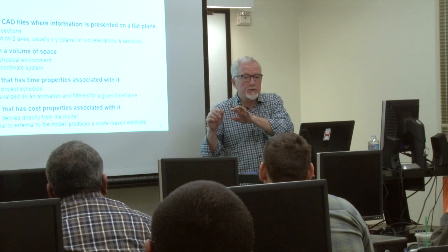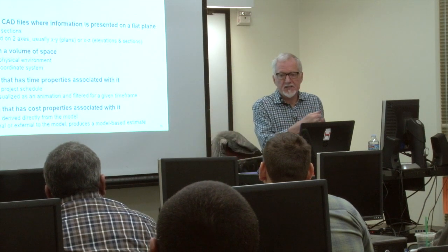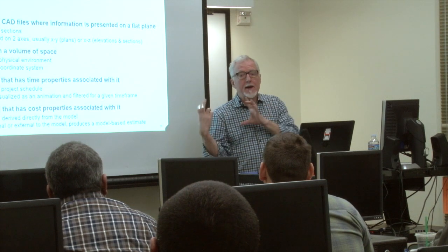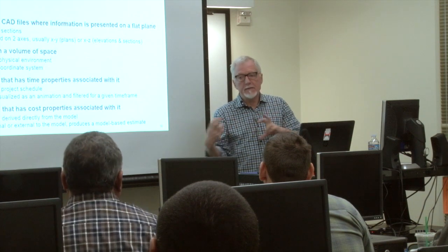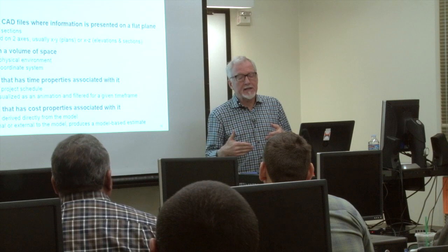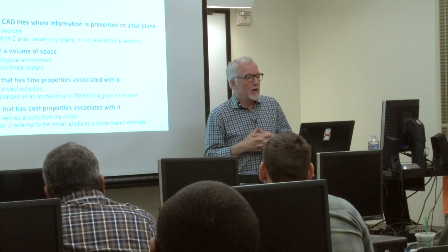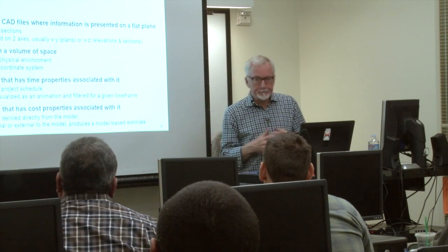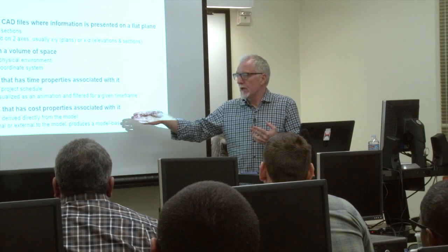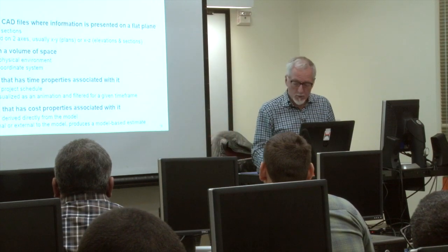And with concrete, we're also interested in square footage on the top, so we have to finish the top of that footing. We're interested in vertical areas because we have to buy the formwork that makes up the edge forms. There's a lot of variables associated with something like concrete, but it would be true for anything: painting, drywall, electrical conduit, you name it. We can assign parameters to our 5D model and feed our costs through. Really powerful stuff.